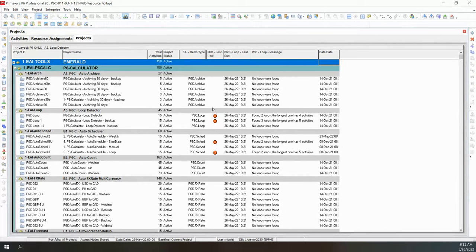And we want to make sure that when the data dates move, everything works properly. So something that could cause you not to be able to schedule. Okay, so in theory, the scheduler does the updates, they move the data date, they schedule. Now, sometimes what happens is people forget to move the data date.